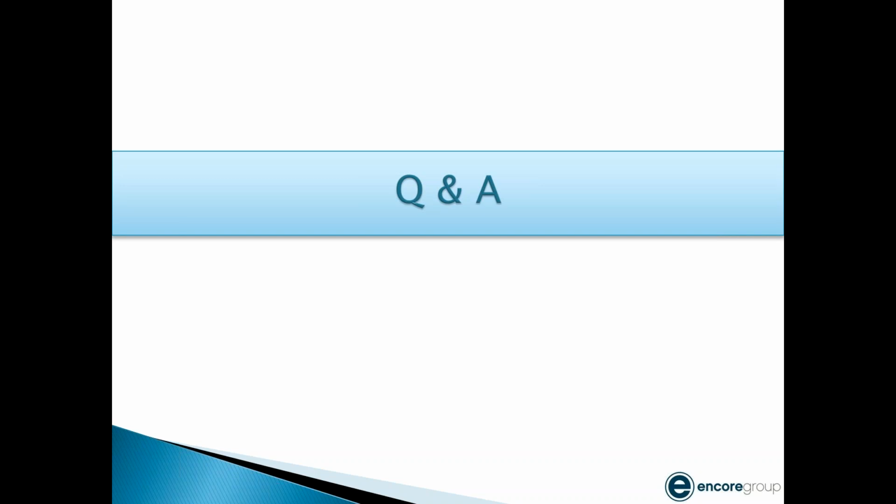Have another question here from Gabriel: do you ever rebaseline? Typically the term rebaseline comes into play when there's been a major change order, right? That's where the contract end date is changed. That's the most common time when a so-called rebaseline is done.